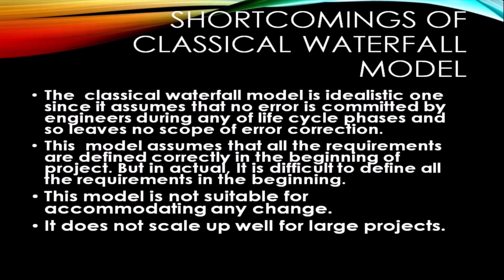Shortcomings of the classical waterfall model. The classical waterfall model is an idealistic one, since it assumes that no error is committed by engineers during any of the life cycle phases, and so leaves no scope of error correction. This model assumes that all the requirements are defined correctly in the beginning of the project, but in actuality it is difficult to define all the requirements in the beginning. This model is not suitable for accommodating any change. It does not scale up well for large projects.